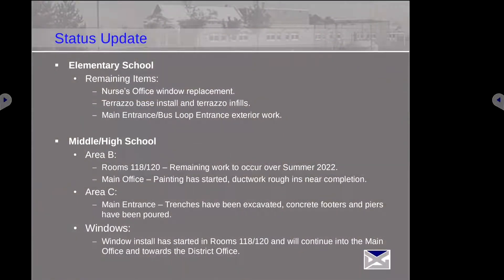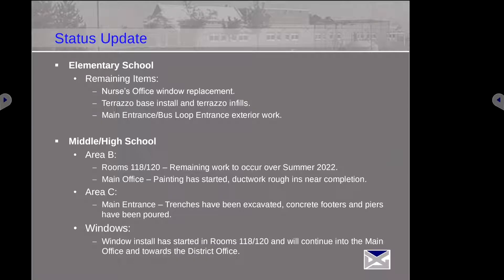We're pretty much out of the elementary school, with a few remaining major items: we still have to replace the window in the nurse's office, do all the terrazzo work in that building, and the exterior work at both entrances still has to get done. This will all get done over the second time. Jumping down to Hillsville High School, Area B — rooms 118 and 120 are wrapped up except for some minor mechanical work to get all the units working.